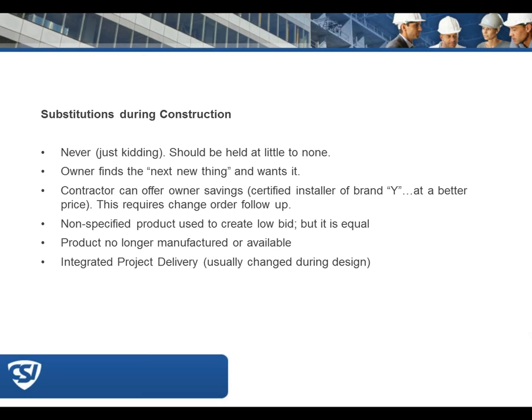It's not unusual that the requested substitution meets the HVAC design criteria or other criteria, depending on what we're talking about here. But because of the size of the equipment of the substitution, it may not fit into the original design spec area. So checking dimensions could become a significant amount of time to confirm the clearances, and there is more to approving a substitution than just meeting the minimum design intent.